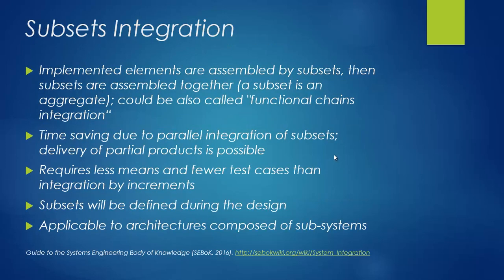In the subsets integration technique, the elements are assembled by subsets, then subsets are assembled together. The subset is a group of elements or an aggregate, or could be called functional chain integration. Integration through subsets is time saving due to parallel integration of subsets.